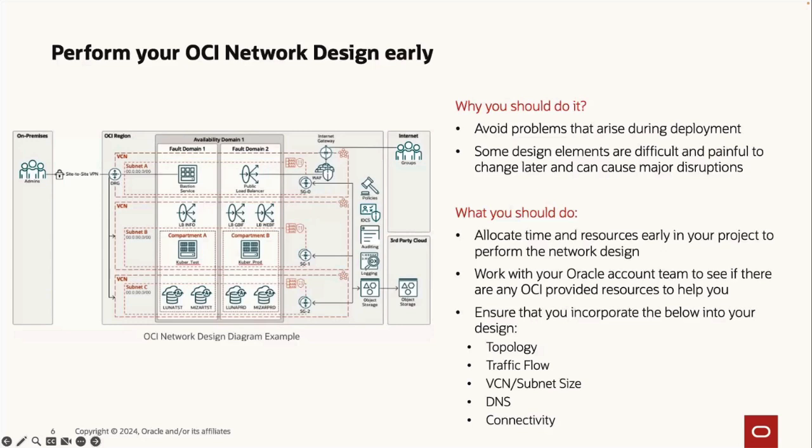That's when we realize there's a problem, because they didn't go through and actually think about how to design it the right way. So what we recommend customers do is, in the project plan, make sure you allocate the right resources. Get folks from your network team involved early, and allow time in that project plan for them to put this work effort in. That way, you go in with the right design that meets your requirements.